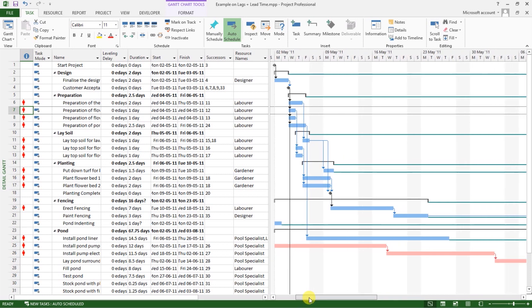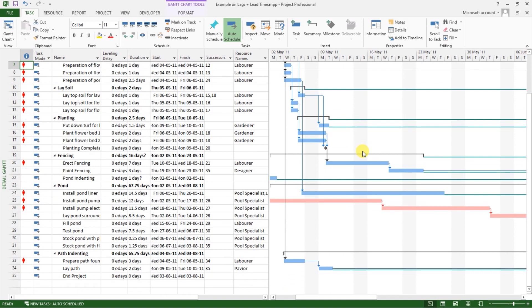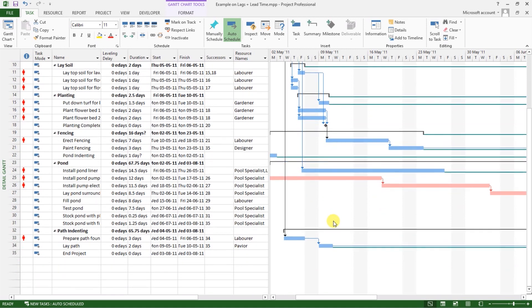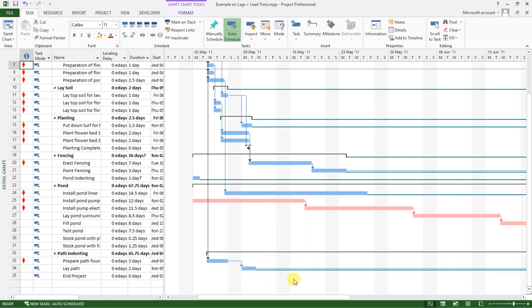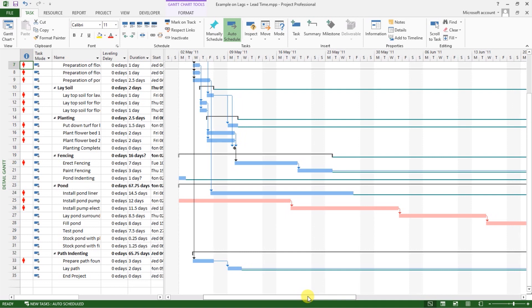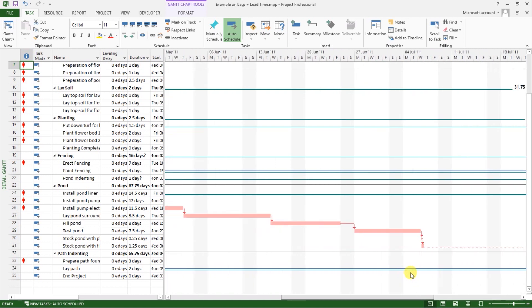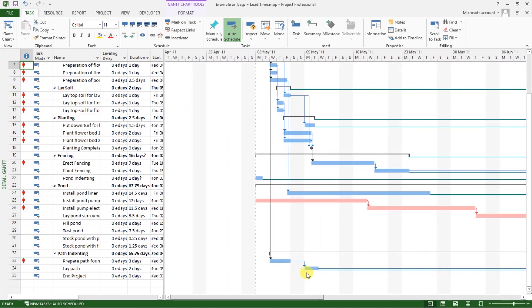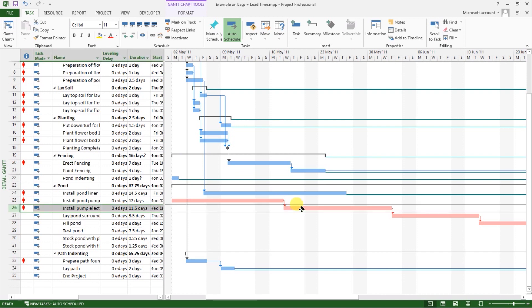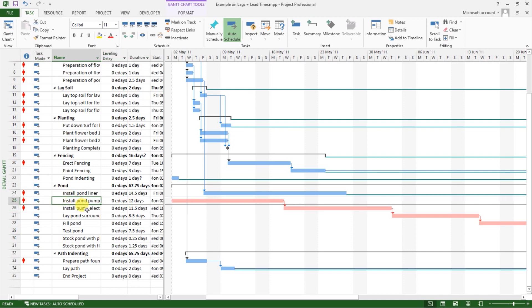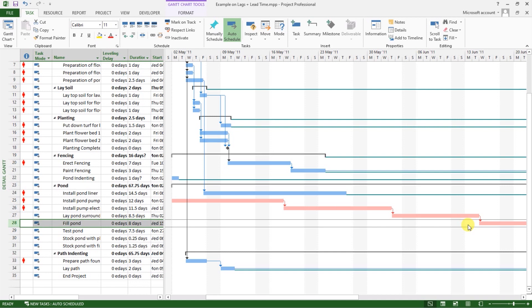On the right side, we now have some tasks or activities with a bar that is blue and some others that have a bar that is red. Now the ones represented in blue are the non-critical activities and the ones represented in red are the critical activities. So if you move your mouse over this, you see activity number 25 and 26, 27. Following that line, all those are critical activities.